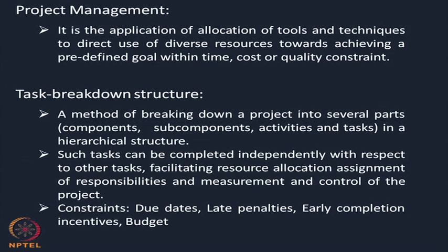And similarly, there may be an early completion incentive. In place of 6 months, if I can complete a job or project within, say, 5.5 months, I will get an extra amount of 2% or 3%. These are early completion incentives. And similarly, we have budgets, budgetary constraints are always available.